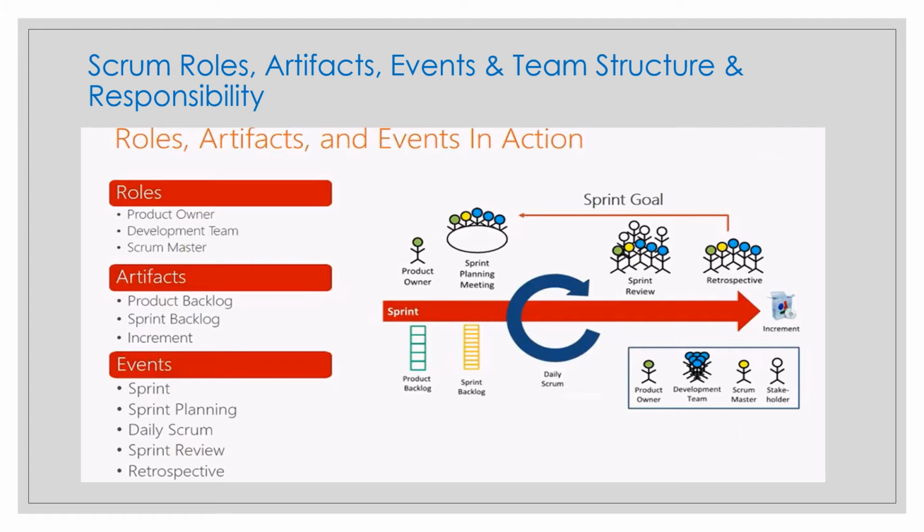So when they break down the product backlog item, they include it in the sprint backlog. They do the sizing and all of that in refinement, and an epic will be divided into different smaller chunks of work, such as user stories, tasks and issues, right? And it should be done so that each smaller item can be completed in one day or less. How this will be done is at the sole discretion of the developers, no one else.